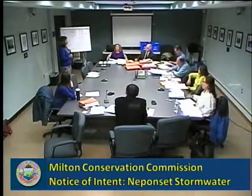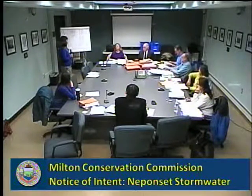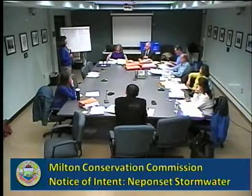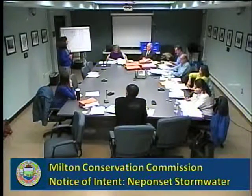The bidding documents are released in June, and then it takes approximately 4 months to select a contractor. Then there will be a 2-year construction period, approximately. Does that answer your question?